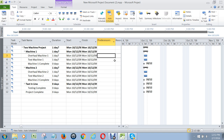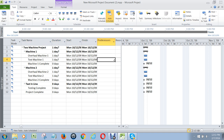When I overhaul machine 1, there's no predecessor to that — every project starts with a first step. There is no predecessor; you can just go in and start doing it. However, if you want to test machine 1, you have to overhaul machine 1 first. So I'm going to put a three here.